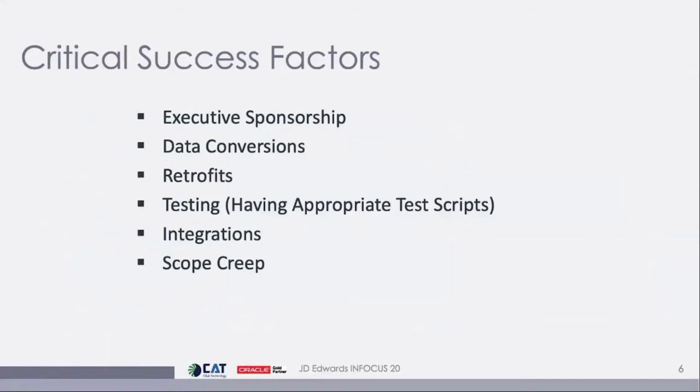you don't actually need. From a testing standpoint, absolutely, this is a full regression test and a migration activity. You need to make sure that you have the appropriate test scripts, making sure that those test scripts are equivalent to the business processes, making sure that you have all of your integrations in place and understood what they are, how they connect from not only a database or a connection side, but how they interact with the new JD Edwards system that you're putting in.